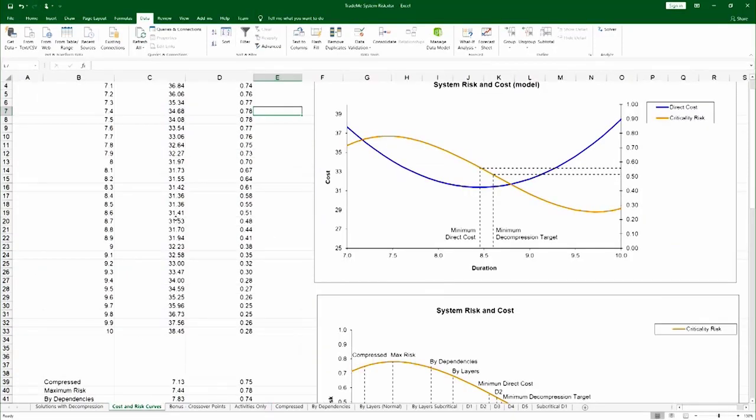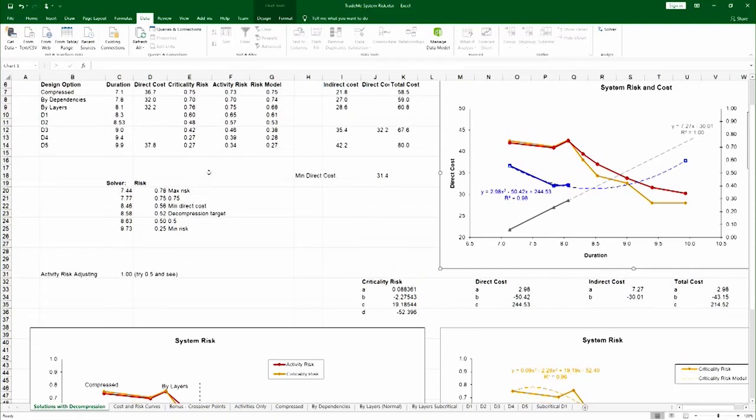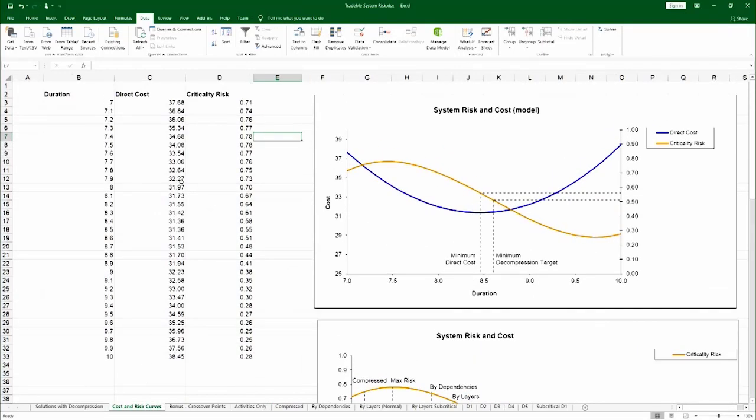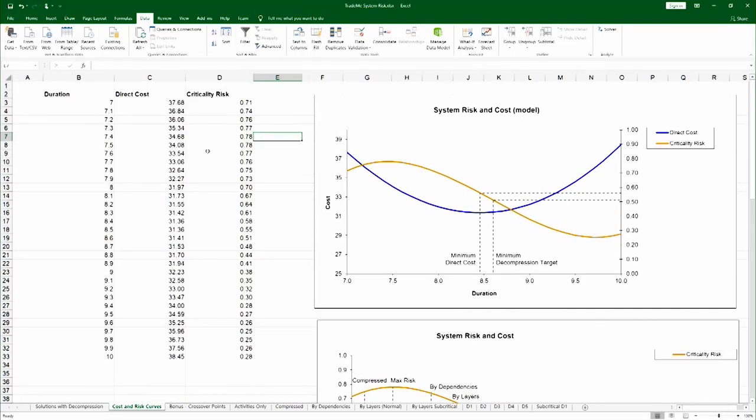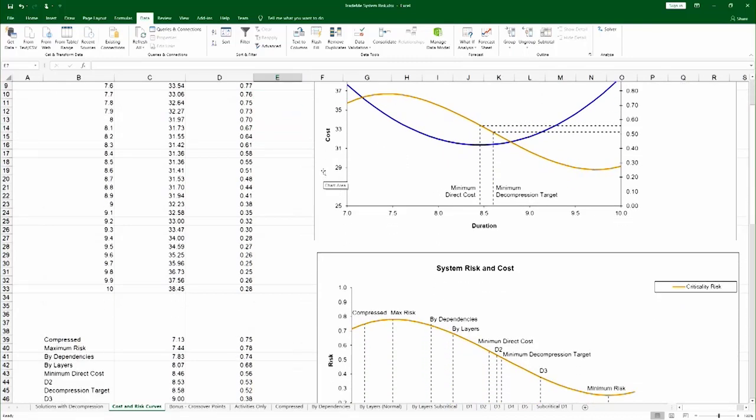The spreadsheet uses the same indirect cost as the other solution. It just extrapolates it. And that enables it to have a full-blown time cost curve adjusted now by the risk. So what you see here is the direct cost curve and the risk curve plotted side by side.